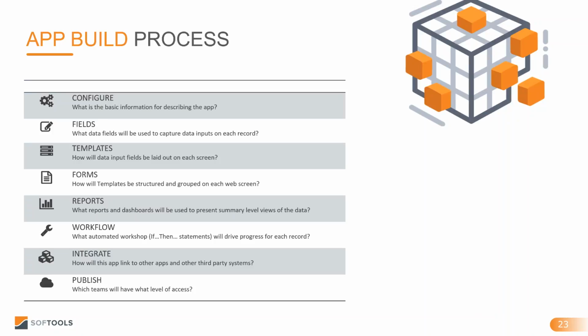For example, workflow may be set up on the application so that if a risk turns status red, the system automatically sends an email to the executive sponsor. So workflow is quite sophisticated, and it starts to bring the application to life. But often we build applications without workflow, and then we add it as we get closer to the implementation.